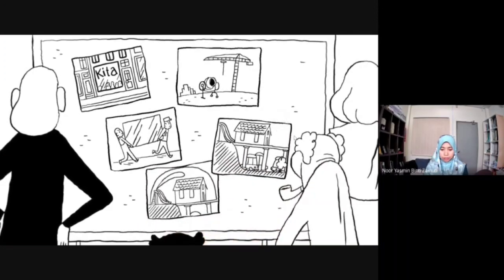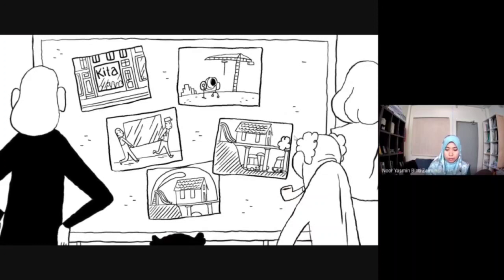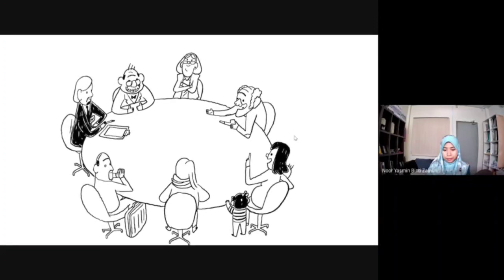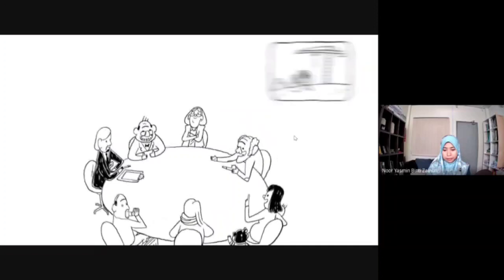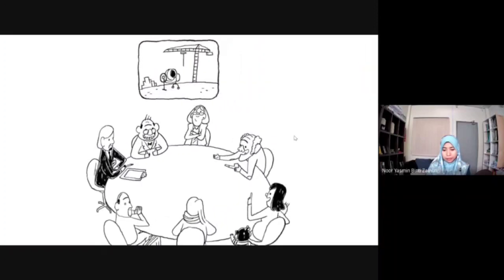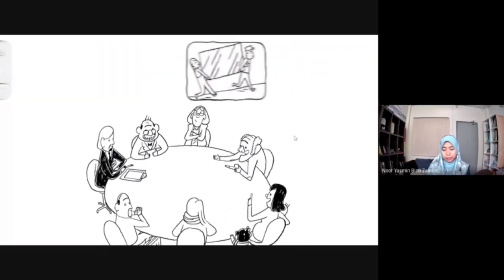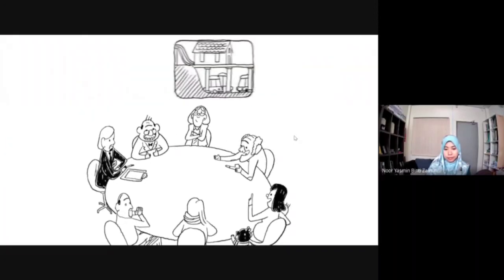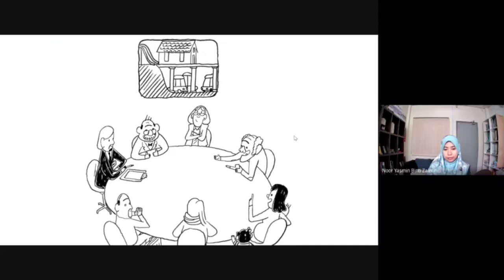Once the team has gathered all ideas without judging them, the evaluation phase begins. The ideas are put into specific form. All of those involved assess whether all requirements are met in the best way possible. Building a new housing development outside town would take too long. Soundproof windows are an improvement for residents, but unfortunately not within budget. The same applies to building an underground car park.